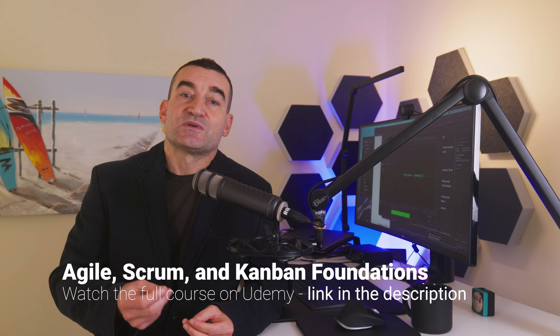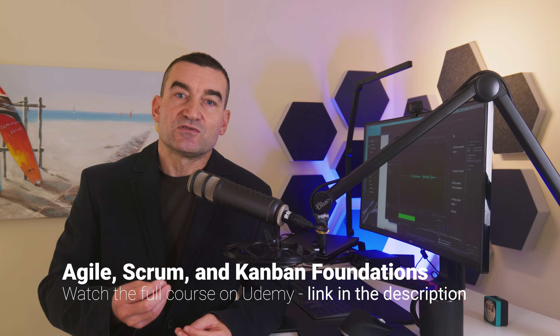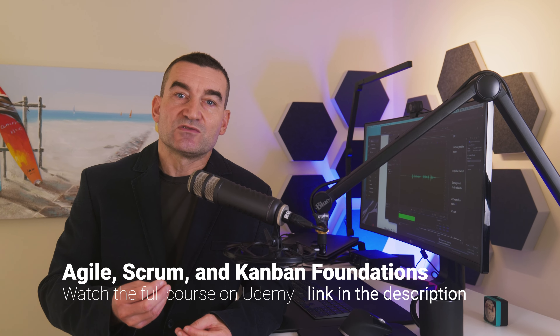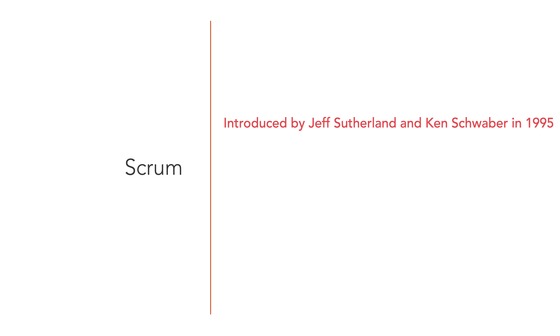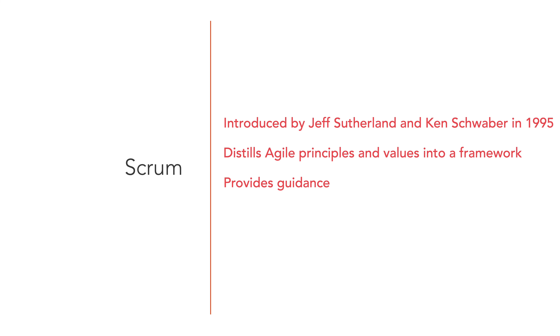So far, we've talked about the principles and values of Agile. While these principles and values are essential, they cannot be directly translated into a concrete methodology. This is where Scrum comes in. The term Scrum was first introduced by Jeff Sutherland and Ken Schwaber in 1995. Scrum takes the values and the principles defined in the Agile manifesto and distills them into a simple-to-follow framework. Scrum provides general guidance for managing complex product development, but it does not define detailed actions. Instead, it focuses on a team-driven, empirical process.